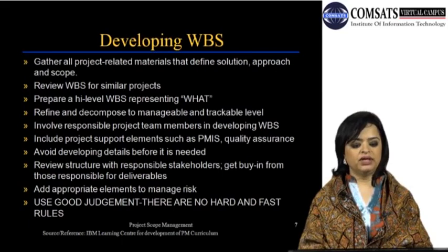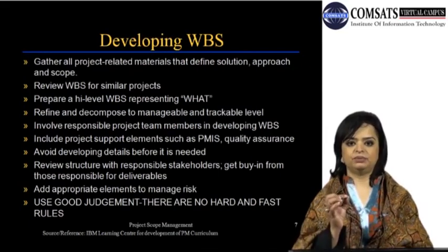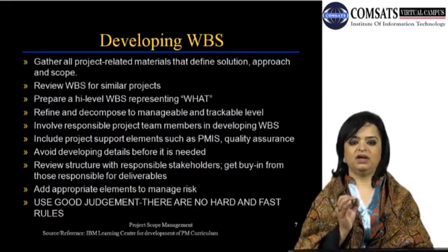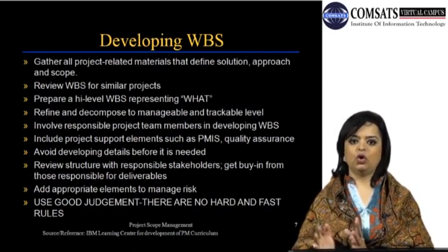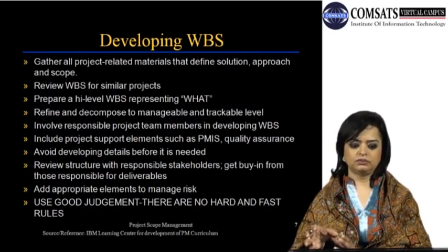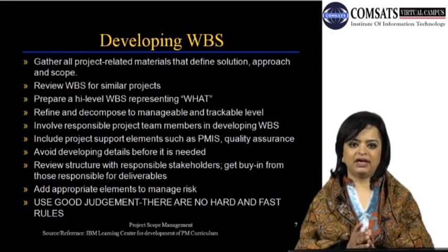Gather all project-related materials that define solution, approach, and scope. So the first step in creation and development of a WBS is to start off with collecting all of the information that will help you design and define the activities of the project.